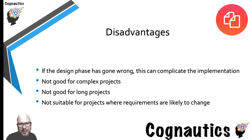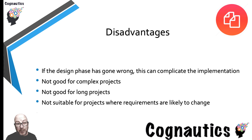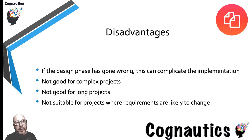The waterfall is best suited to smaller projects where you know things up front. However, there are areas where it would be a really poor choice. If the design phase has gone wrong, having to go back a stage and return wastes time — and time equals money. So unless you know up front what you're doing, this could be a very costly approach. For complex projects or longer projects this would not work at all, and if requirements are going to change, this would be the worst choice of project methodology.